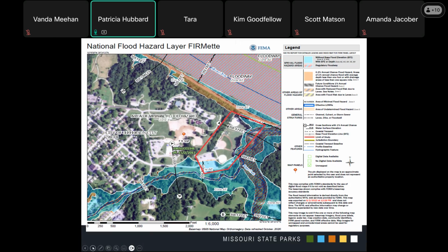So just so you know, for the wetland, the floodplain, your IPAC, and your Missouri Heritage, if those reports are older than 90 days, you will need to rerun them, okay? Especially your IPAC, because they have just updated the bats and they've added new species in Missouri. And the floodplain maps have been updated within the last 6 months. So if you have these from last year, please redo them and update them to get the most current version.